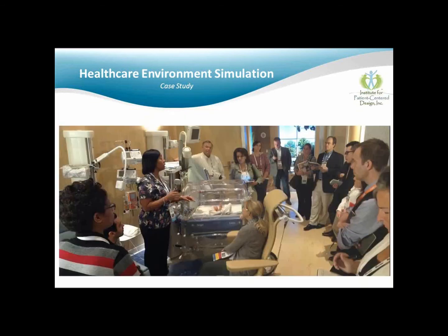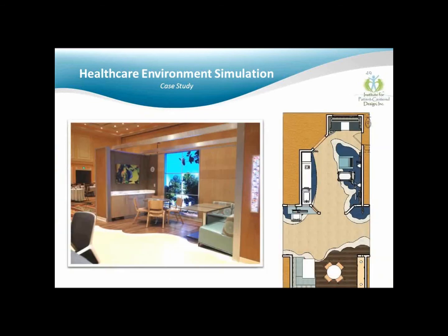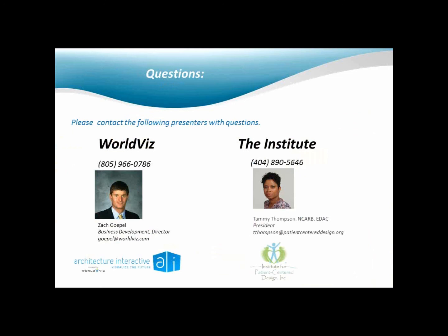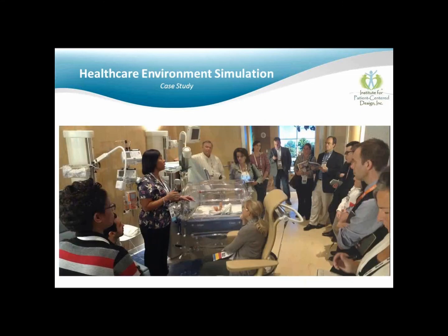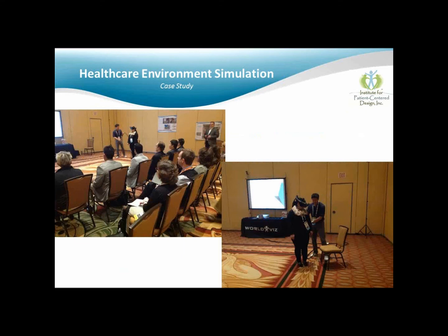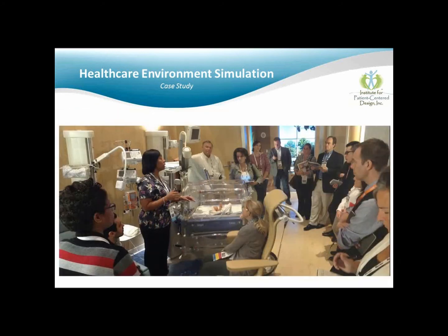And then we, of course, have a charge for the service that we provide to travel on site and bring the equipment and set up the technology and allow the design review or the mock-up or the users to be run through for a couple days. So between the two of those, it was approximately 10% of the 200K, so about 20,000. Okay, so this is good information for planning purposes on a project.